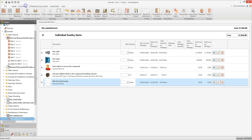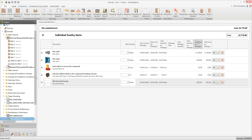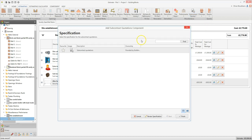Returning to the estimating tab, you can use the preliminaries drop down menu to add design costs, travel costs, preliminary costs and so on to your estimate. You may want to add some subcontract quotations for fixed price quotes. Let's say you want to add a plumbing subcontract quotation. On the estimating tab click on the subcontract quotes button and select subcontract quotations from the drop down menu. Select the subcontract quotations specification and click finish.